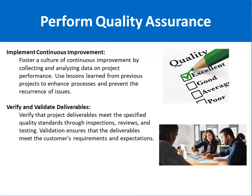Verify and validate deliverables: verify means ensuring that project deliverables meet specific quality standards through inspections, reviews, and testing. Validation ensures that the deliverables meet the customer's requirements and expectations. This is the main difference between verify and validate.